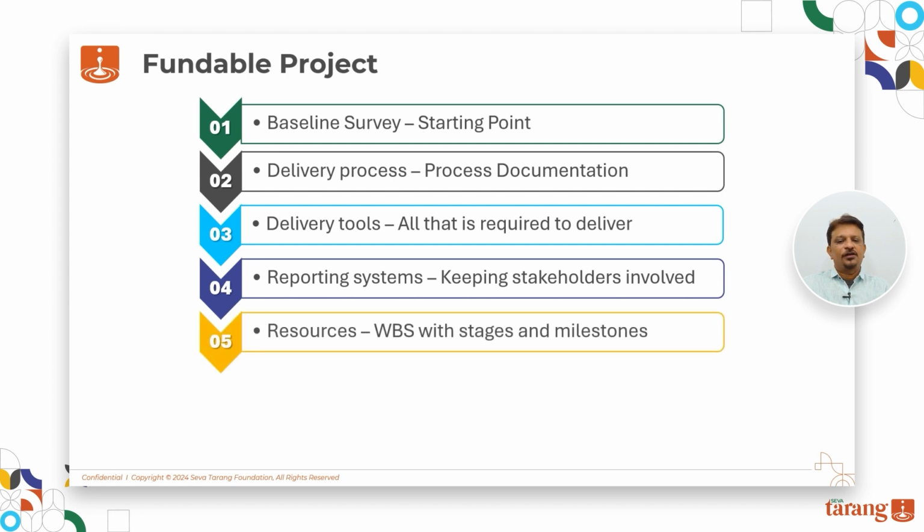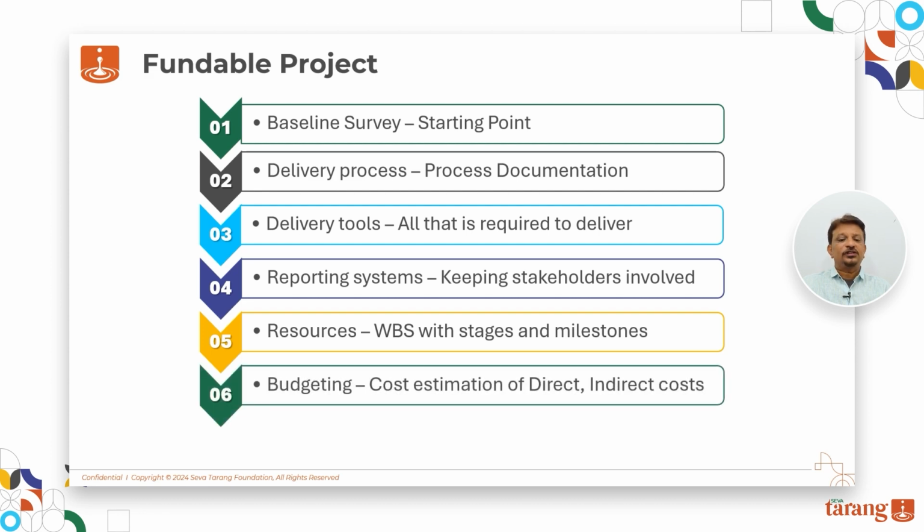Resources. To arrive at a most reasonable, acceptable, and adequate budget, breaking down all the goals, objectives, and milestones of the project into smaller, manageable tasks will give you an idea of the exact resource requirement of the project at every stage. It will lead to the last stage, budgeting.